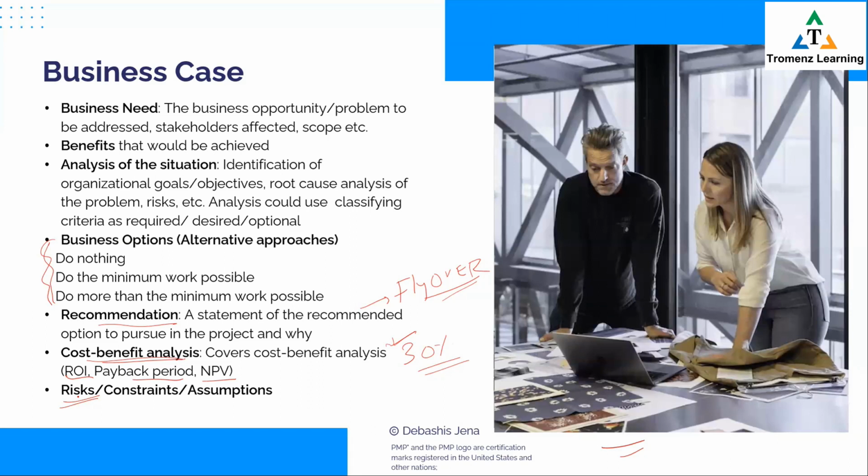There's only a 20% probability of success. Only 20%. I'm not in. I would prefer a project which has less ROI, maybe 35%, but is a safer project, 80-90% probability of success. I hope I'm making sense. All I'm trying to sell is that when it comes to decision making, the amount of risk is very much a consideration.